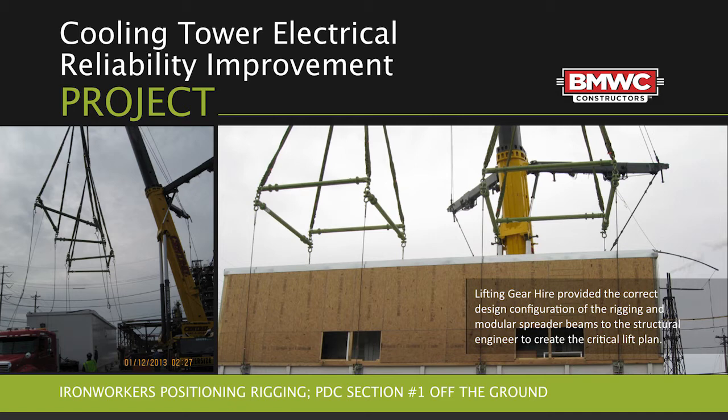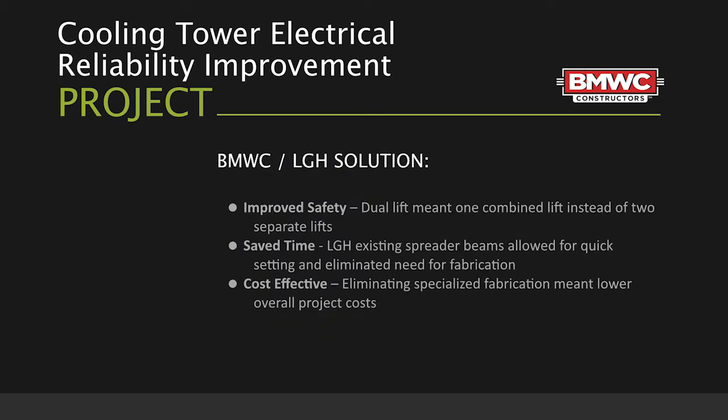So now they're looking into a time and schedule crunch of when they're actually going to be able to set these modules. If they were to take the power lines out of play, they would have to do it during a slowdown, shutdown, or turnaround, which would have extended the project. It would have delayed the project significantly.